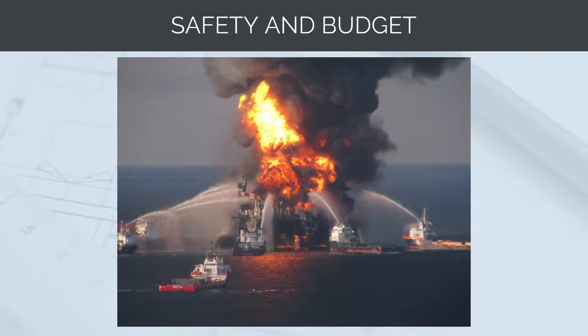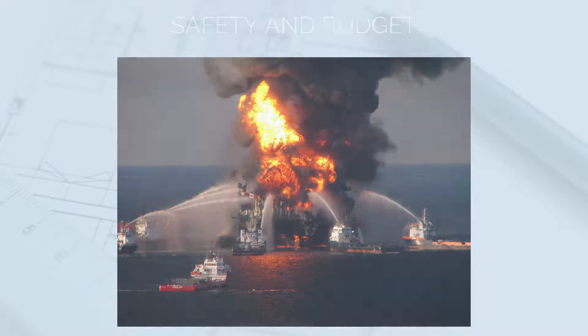The central cause of the explosion aboard the drilling rig was a failure of the cement at the base of the well that was meant to contain the bore. An independent investigation found five examples of where BP had cut costs that contributed to the disaster. Unfortunately, when we put budgets under pressure, some of the cost savings identified may be non-negotiables, and our savings may lead to bigger problems.